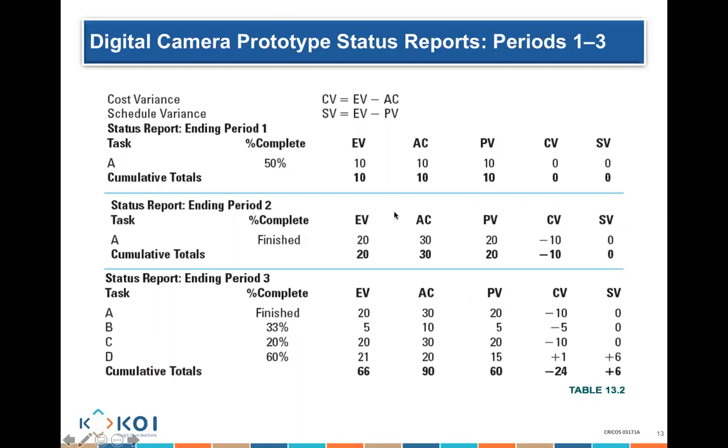Actually, before you do that, yes? So if it's negative, it's over budget? Over budget. So that means they budgeted too much? No, that means we spent more money and earned less. We earned less work than how much money we spent. Make sense? Okay, and positive is under budget. Correct. Okay, thank you. No worries.